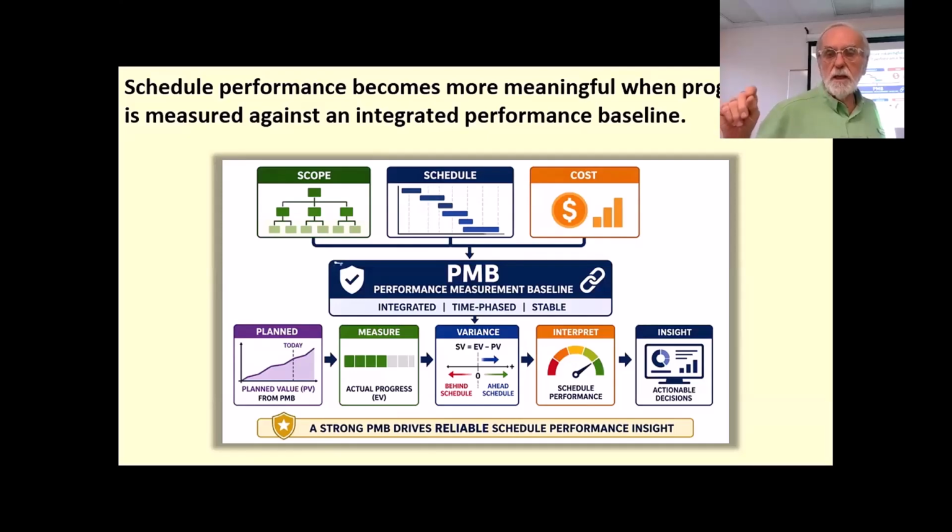So we have to have that baseline. It depends on decomposing the work, time, phase, budget, all the things we've been talking about, represented in this performance measurement baseline. And this matters because earned value schedule analysis, now we're specifically talking about it, is not based on calendar dates. It's based on the relationship between the work that was planned to be accomplished by a certain point in time and the work that's actually been earned or completed. And that means planned value comes from the baseline that's both time phased and budgeted. So it's all the same concept as we had with cost management. It's not just from a list of milestones.